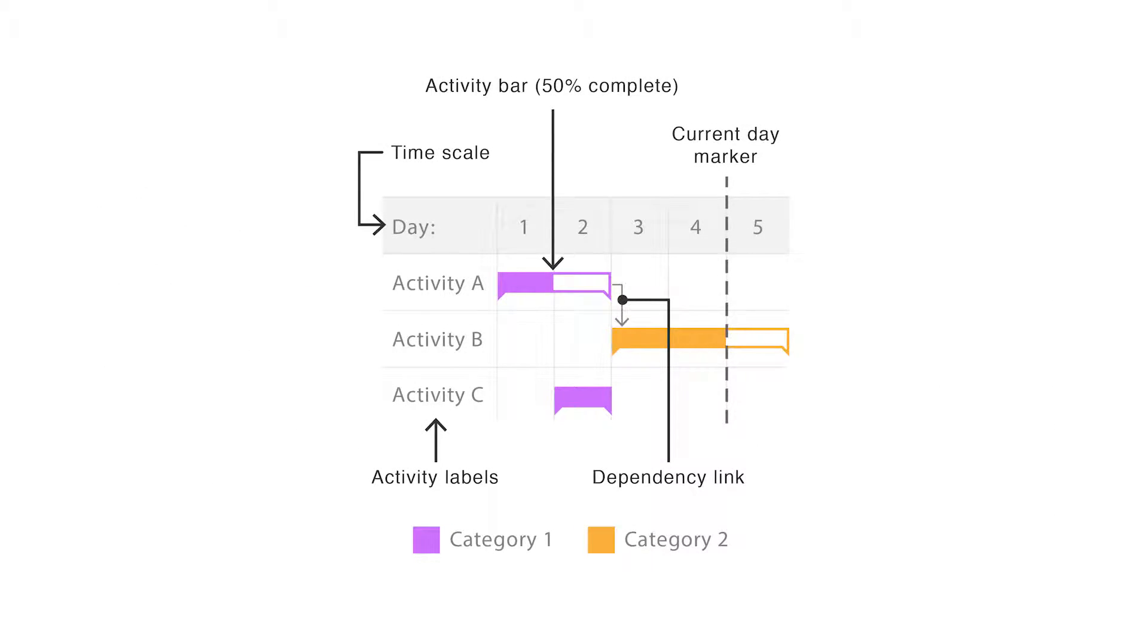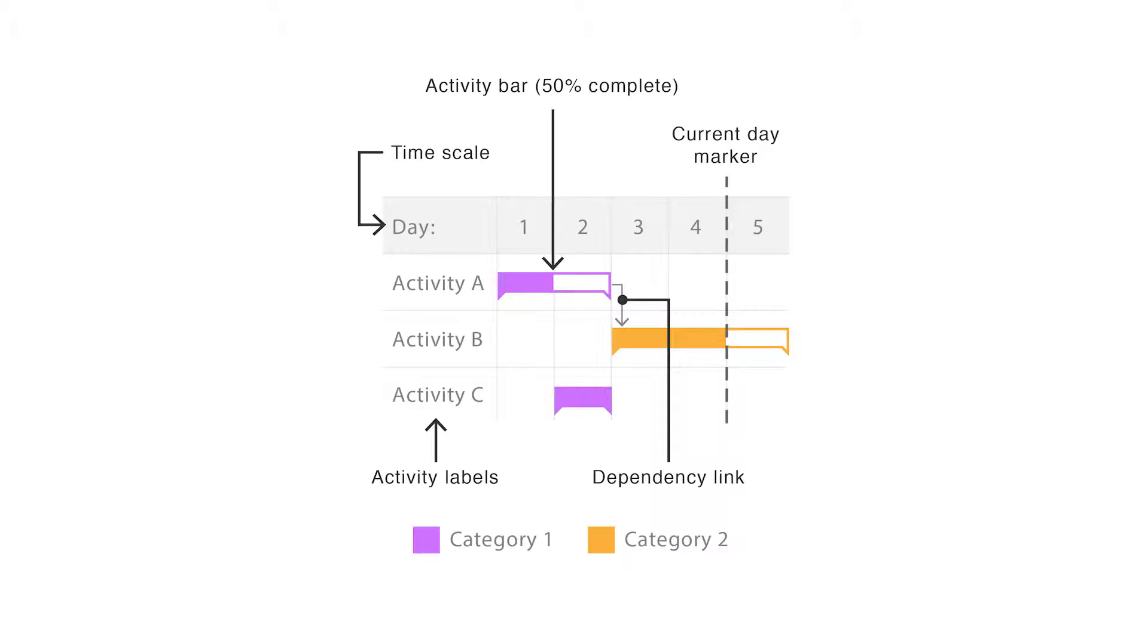Gantt charts are drawn within a table. Rows are used for the activities and columns are used as a timescale. The duration of each activity is represented by the line of a bar plotted along this timescale.